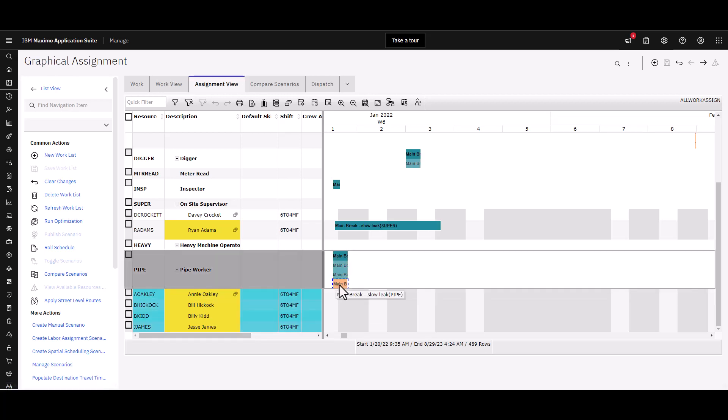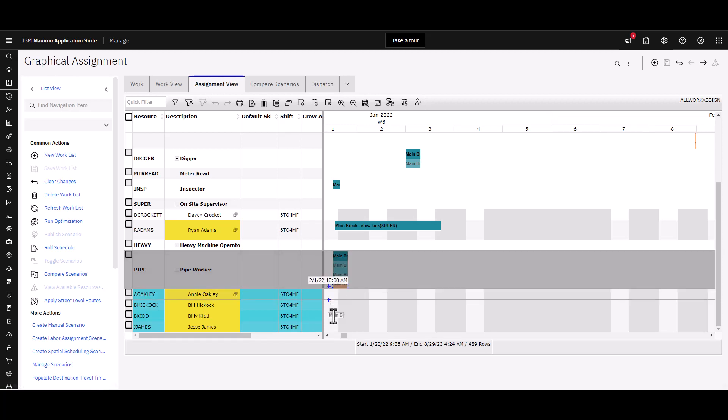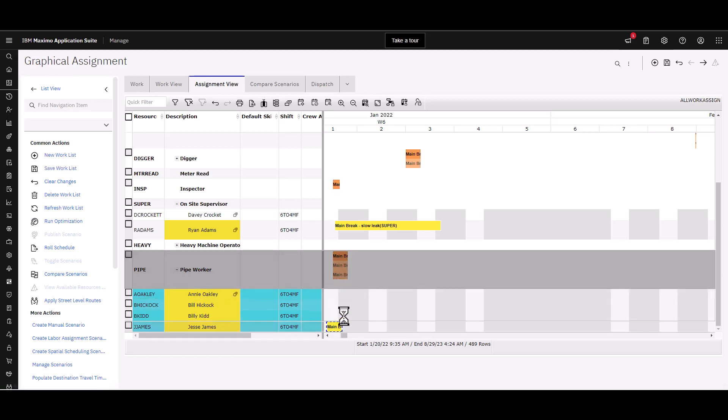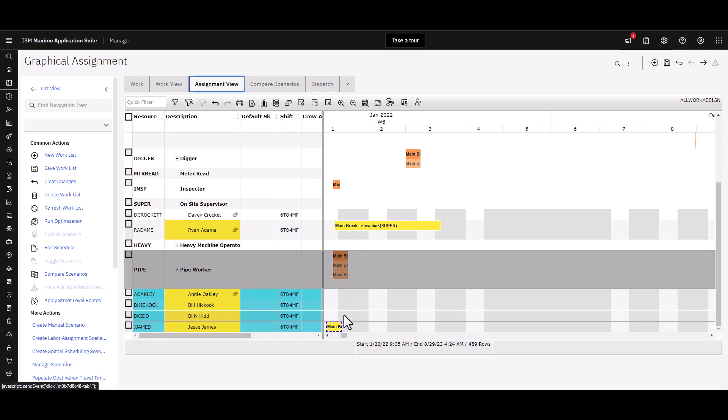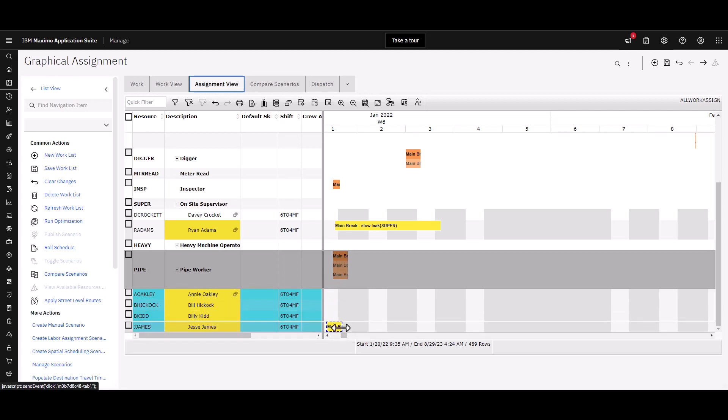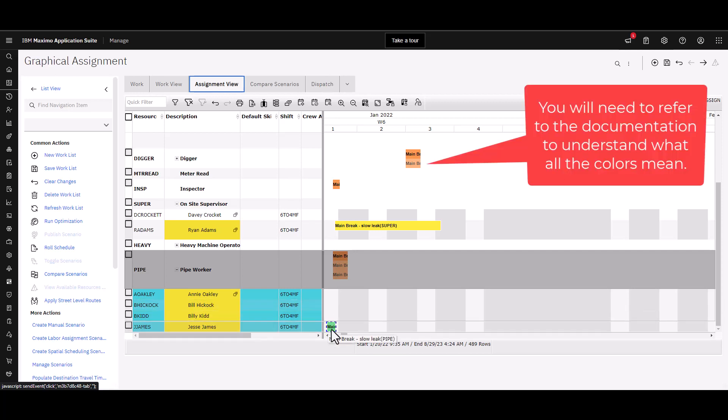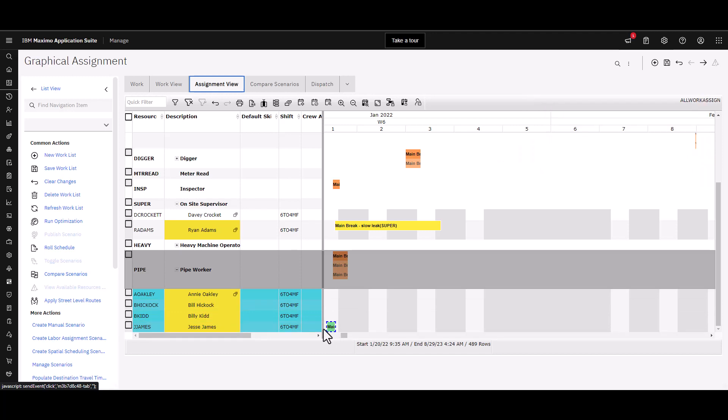If I wanted to grab just the one task here, I can hold my mouse down and I will assign that to Jesse. You notice that it's yellow because I put it in an area that they're not available. If I move it here into an area where they are available, then it turns green.